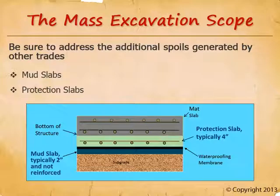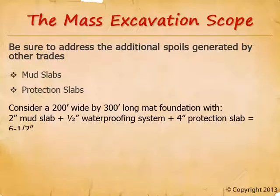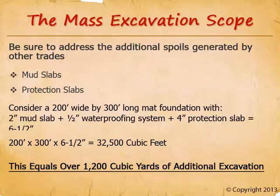The thickness of the waterproofing membrane — typically about a half inch — will not be addressed by the civil engineer on their drawings. The excavation bidders are looking at the civil drawings when preparing their estimates, so that waterproofing membrane is another half inch of depth they need to account for. These slabs are only a few inches thick, so it wouldn't seem like much, but consider this calculation: a 200-foot by 300-foot mat foundation with a 2-inch mud slab, a half-inch waterproofing system, and a 4-inch protection slab totals 6.5 inches. That equals 32,500 cubic feet — over 1,200 cubic yards of additional excavation. When the general contractor forgets to address this in the bid instructions, they end up on the hook for one heck of a big change order request from the excavation subcontractor.